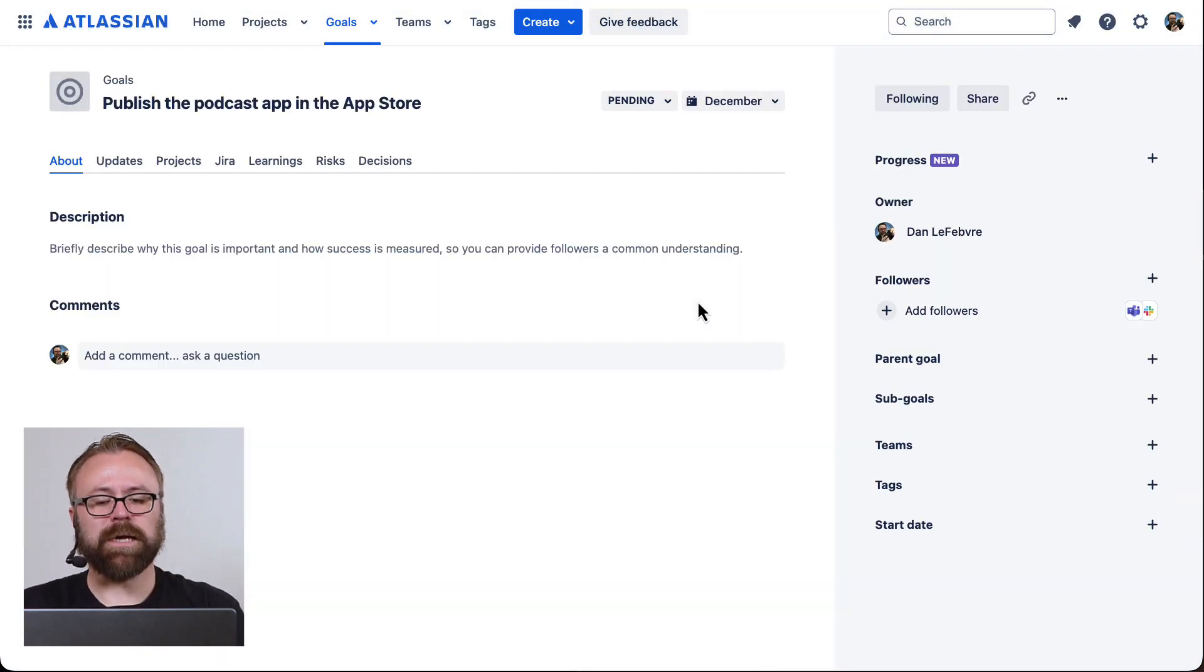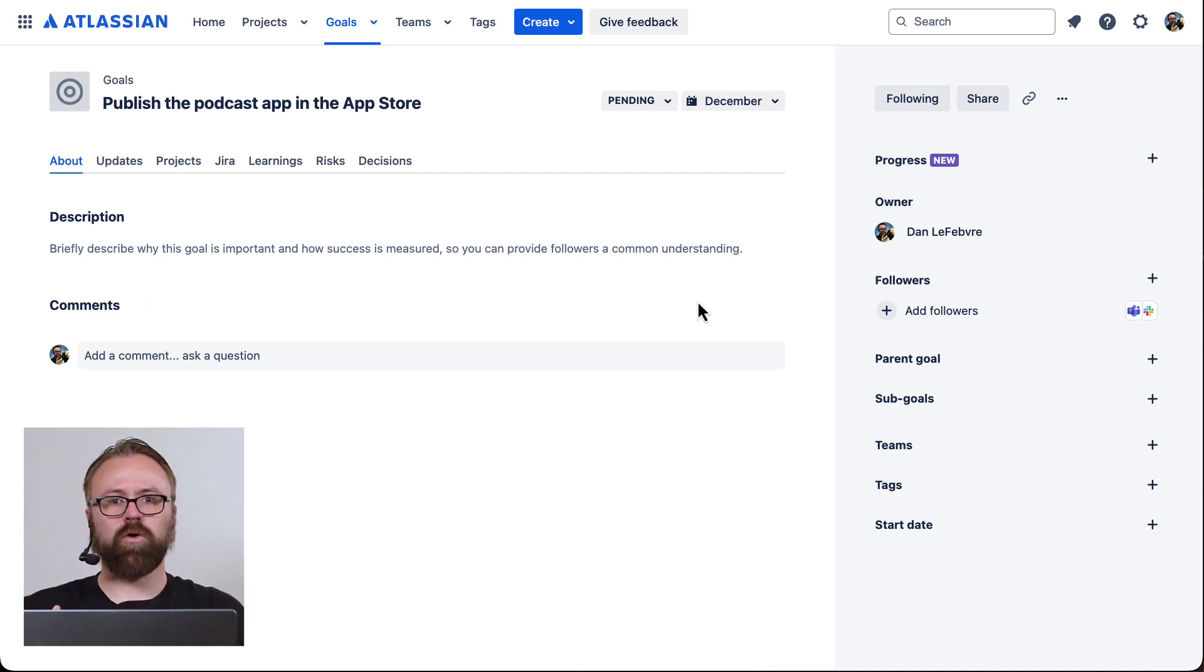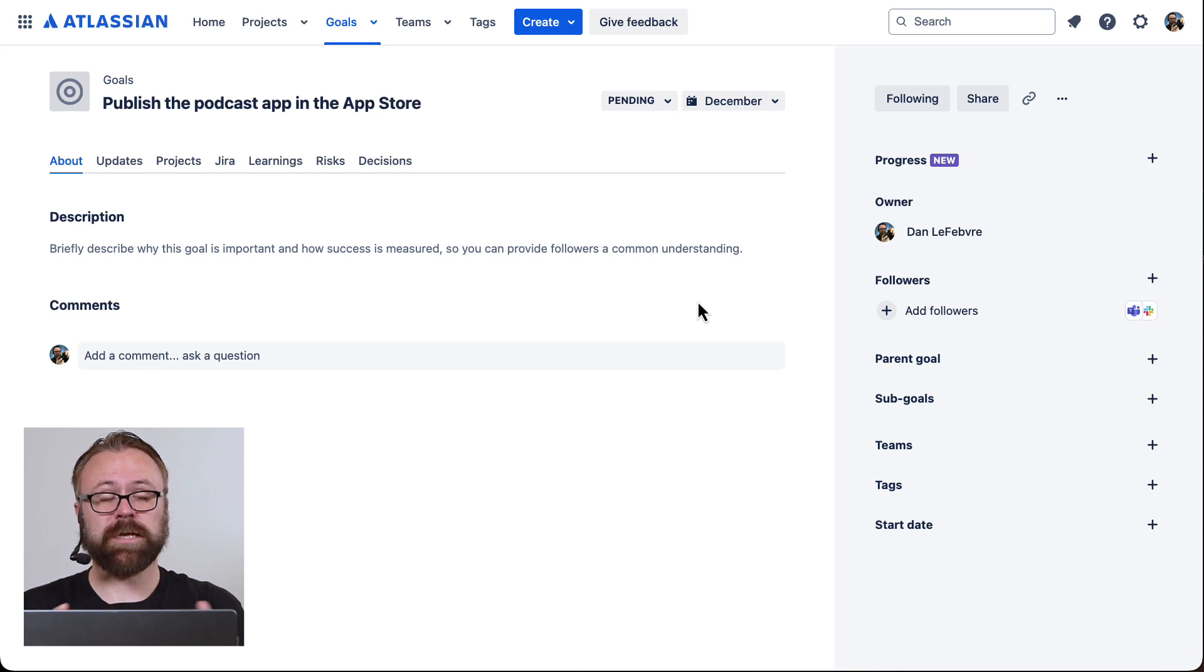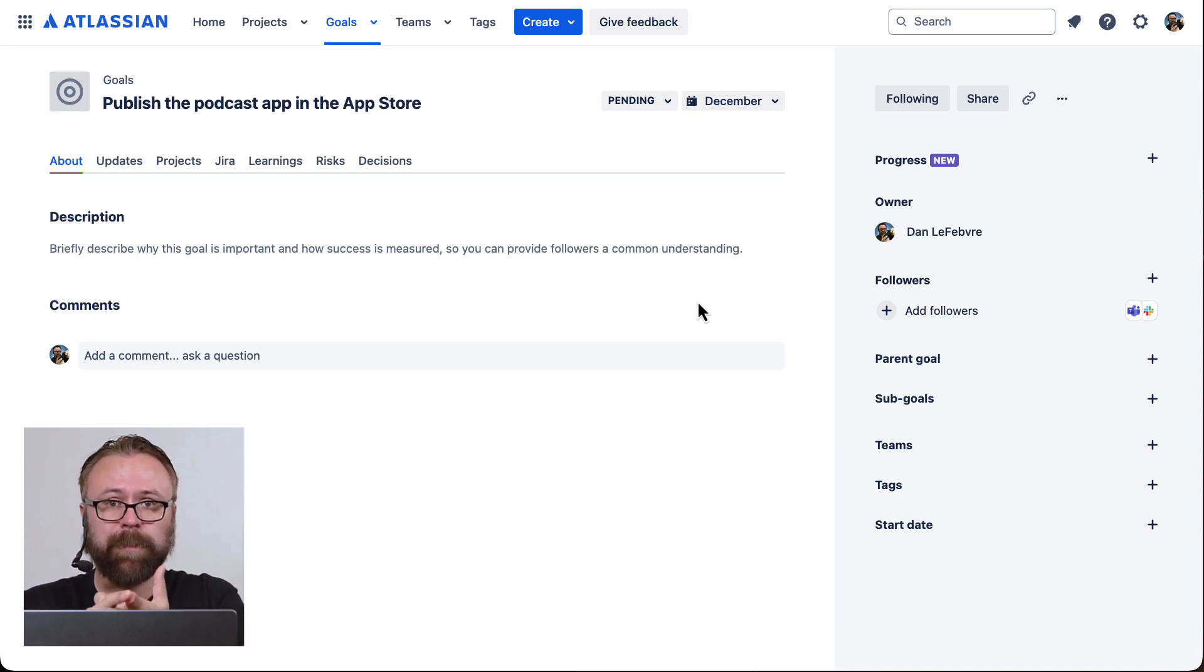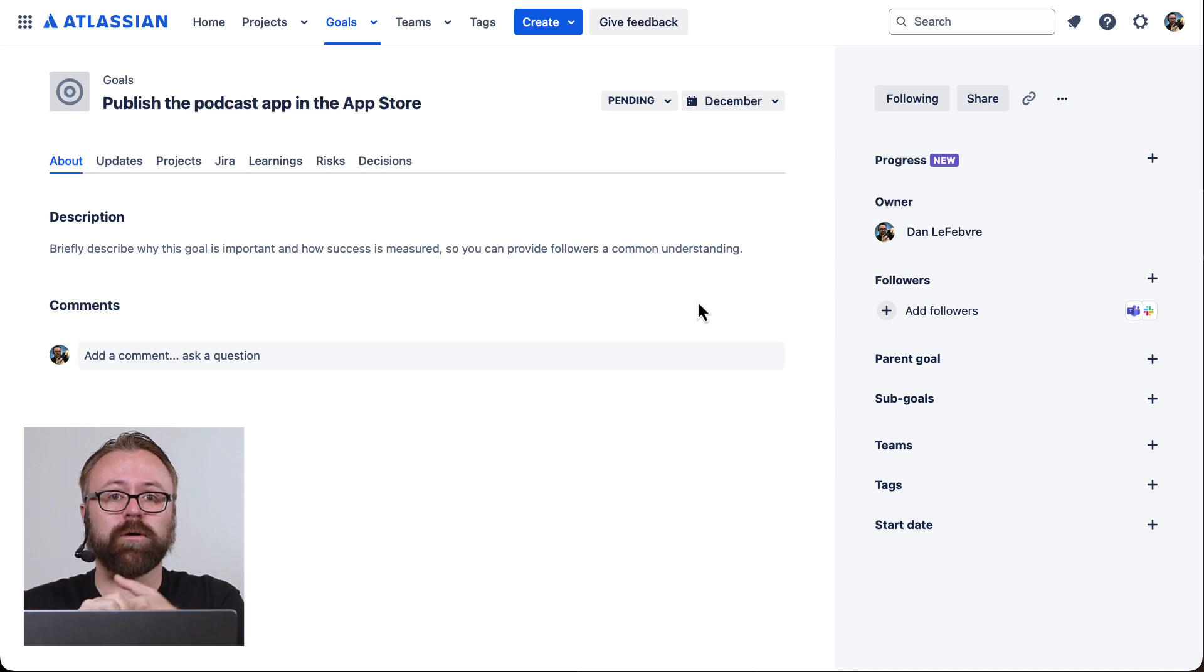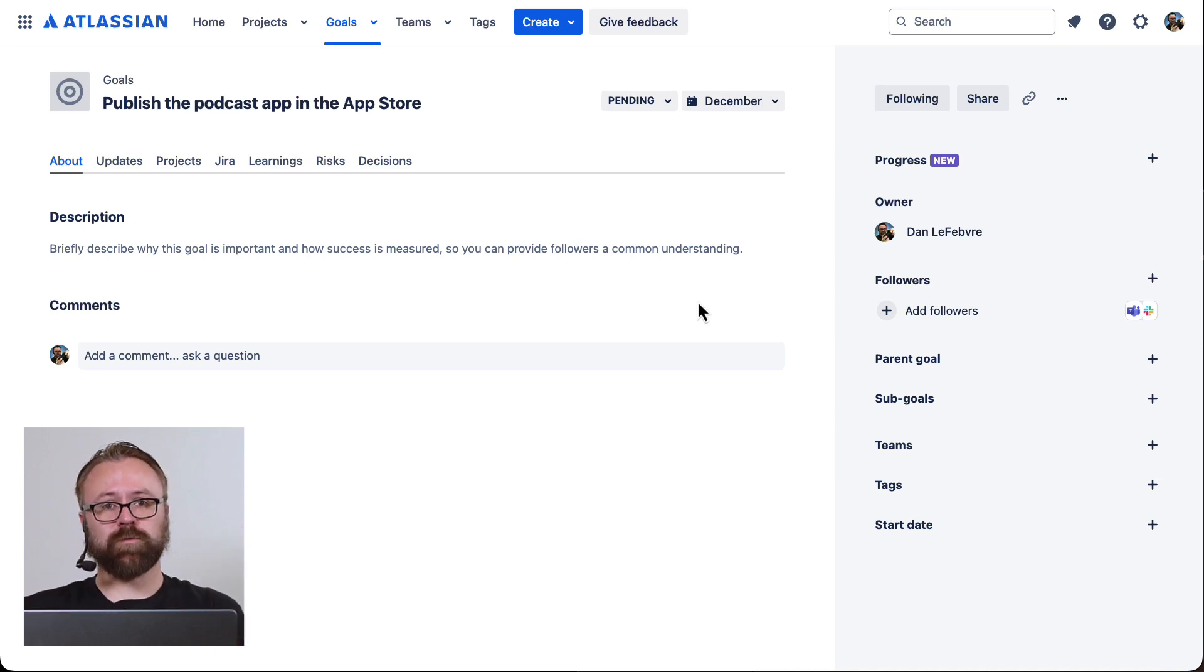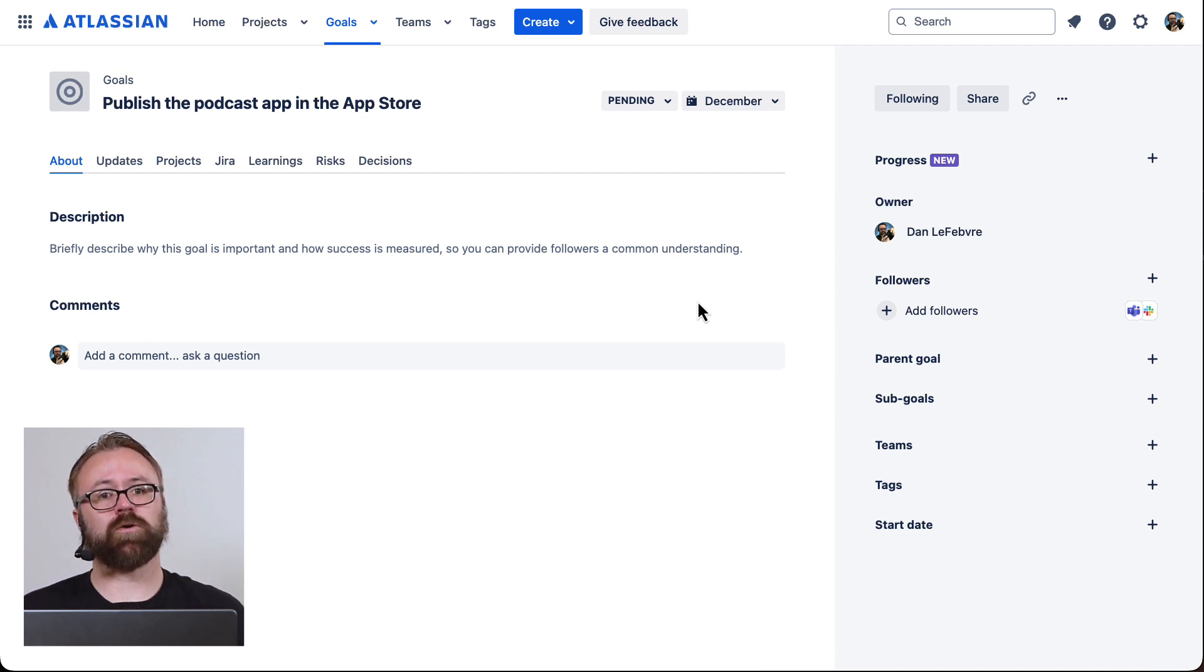Now that we have a goal created, you'll notice that we have this whole other interface where we can link issues, projects, and things from inside JIRA to the goal. Maybe we have a project to get the app designed, another for the dev team to build the functionality. Then we can tie together the epics from different projects to the goal as a way of tracking it all, sharing updates across all the teams and so on.